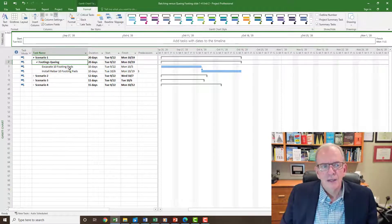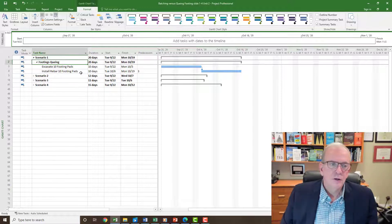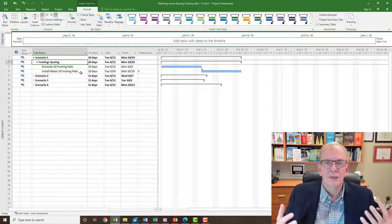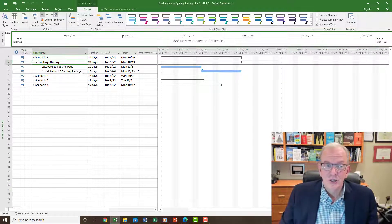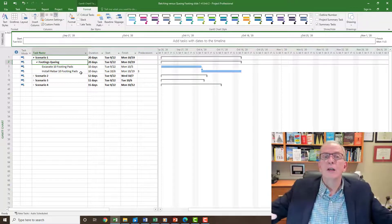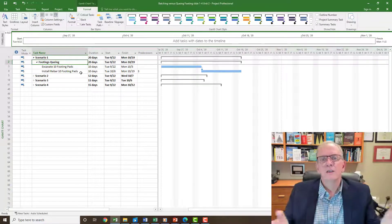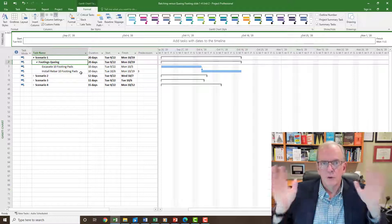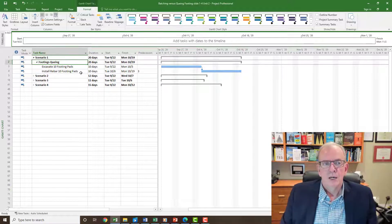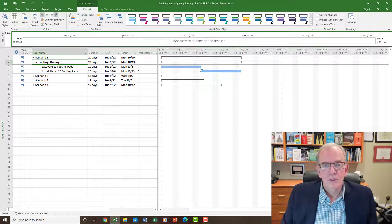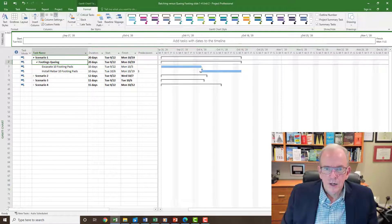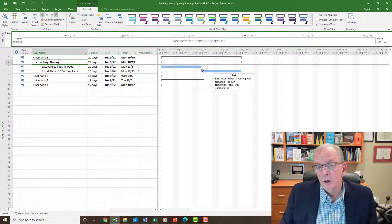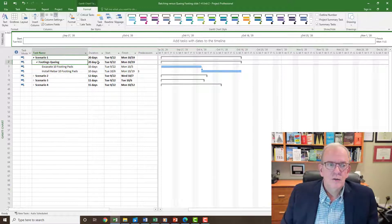So we've got to excavate 10 footing pads and then we've got to install the rebar in 10 footing pads. Using the queuing method which is very common in construction is like, I want this area, this is ours, we're going to excavate it all out and then you can bring in whoever you want later. Now what that means is you've got to wait those 10 working days, and then the rebar subcontractor will come in and then they're going to start to do their rebar for another 10 days, so the total time period for that is 20 days.